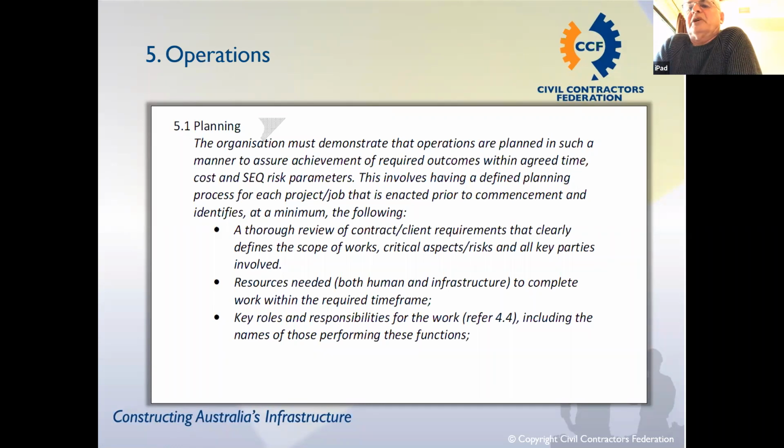I'm not going to go through all those 9 dot points, but generally I look at this as having an integrated project management plan, some sort of process. And I always get the comment, I don't need a 40-page project management plan to do this job, which is going to take me 2 days or 3 days. No, you can have a 1 or 2 page plan, but you've got to cover all those elements, even if it's a one-liner. So you've got to demonstrate that you can go to that.